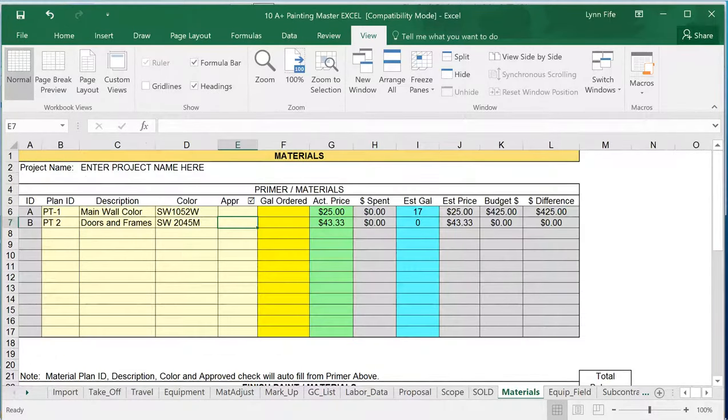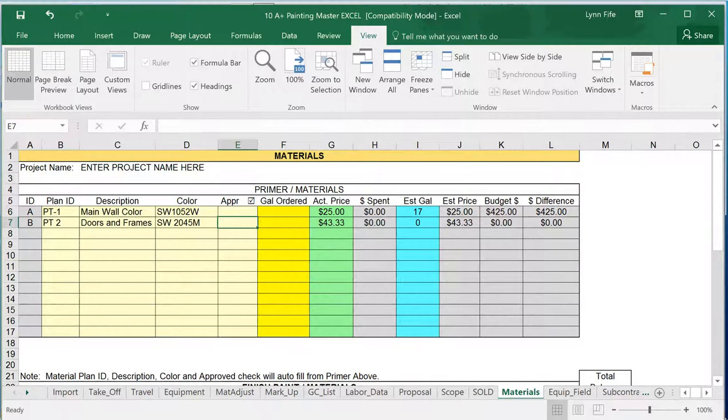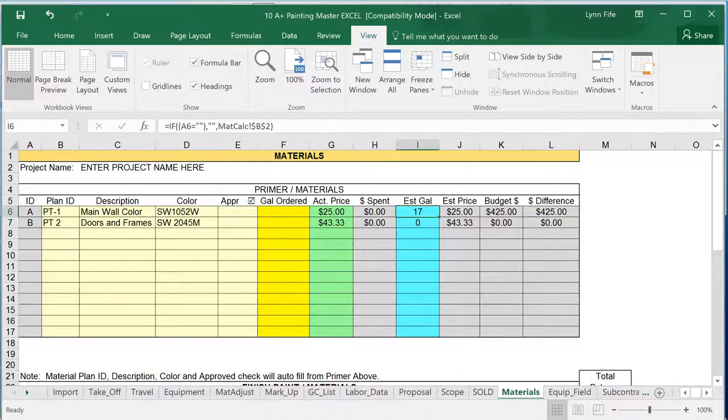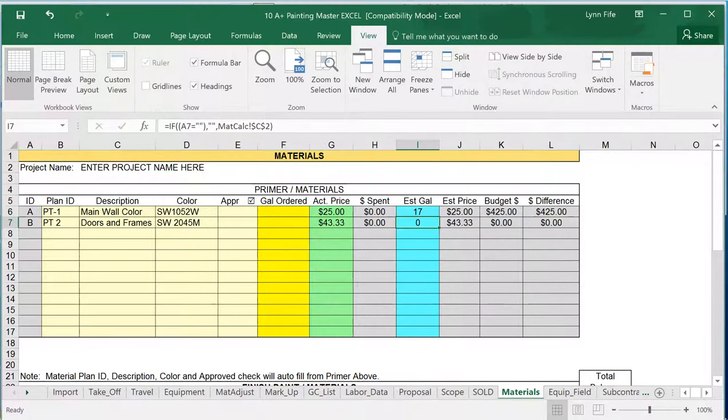For the Materials tab, this is for the field. This is where it will calculate for you. This is my primer materials up here. For primer, we didn't have any, we've estimated 17 gallons of the first material. We have zero gallons estimated for the second materials because they're factory primed.